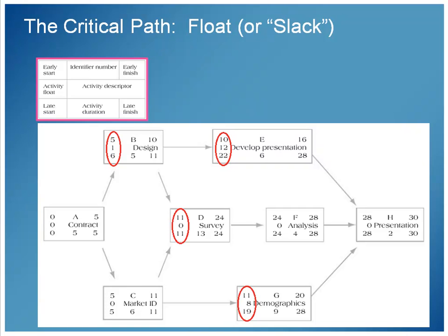It's how much buffer, you'll even hear people say sometimes, how much leeway there is in our schedule in certain places. And we calculate the float or the slack or the buffer for each activity node by simply noticing the difference between the late start time and the early start time. Right, the early start time is optimistic, we get to it really quickly. The late start time is, there's delays elsewhere in the network, well, we can still start it then. So we just subtract those.